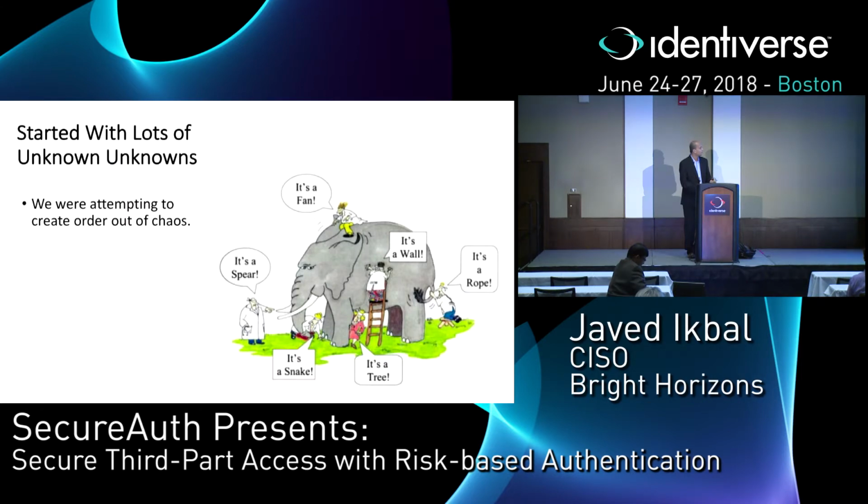And this is what it looked like. For each stakeholder in my company, the answer looked like something different. And the vendor was not exactly caught in the middle, but they were kept waiting while we figured out this answer. So when you are trying to hit a deadline, that's never a good thing. When you have a partner who's waiting for you, that's also not a good thing, because they have these resources optimized. If they are not working on my project, they need to go on another project. They cannot wait indefinitely for us.